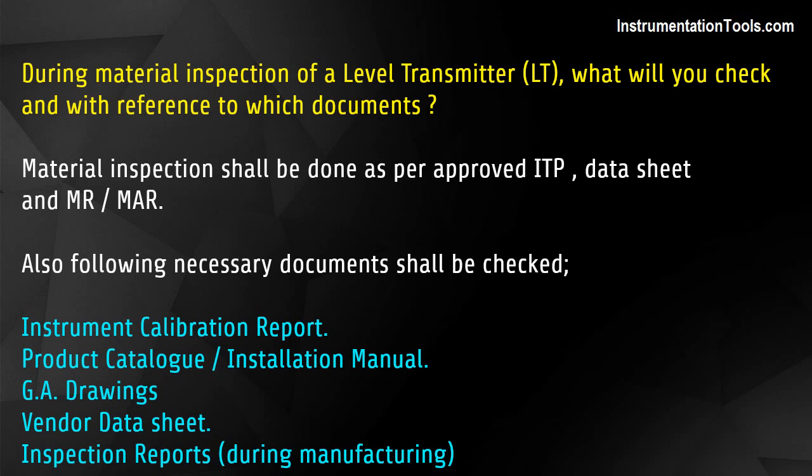During material inspection of a level transmitter (LT), what will you check, and with reference to which documents? Material inspection shall be done as per approved ITP, data sheet, and MR/MAR. The following necessary documents shall also be checked: instrument calibration report, product catalog and installation manual, GA drawings, vendor data sheet, and inspection reports during manufacturing.